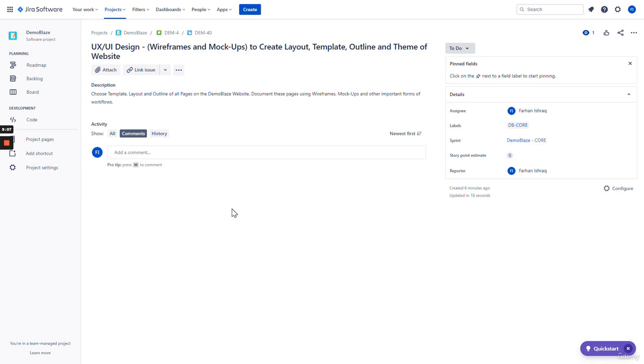Story point estimation is usually done with a team meeting through the sprint planning meeting involving the Scrum Master, product owner, and a very specialized group of people who really know and understand how much time it takes in order to complete a particular task.